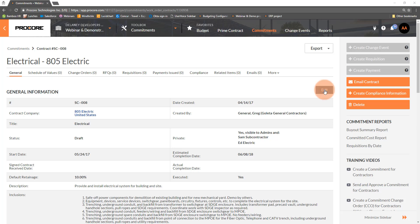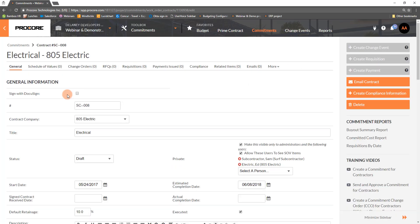Let's start by clicking Edit. At the top left, check the option to Sign with DocuSign. Next, update the status to Out for Signature or whatever status you want to reflect that the commitment is being routed for signature.